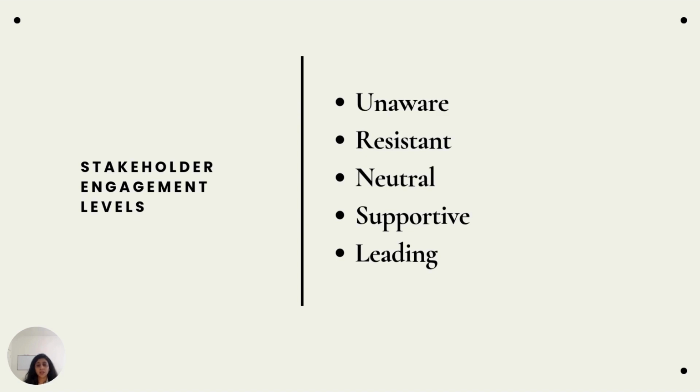And now there are positive stakeholders who are supportive or leading. Supportive stakeholders, they are helpful and willing to assist. And the strategy to maintain them is maintain closely. And leading stakeholders, they are actively promoting the project. And the best strategy for them is empower them and utilize them.